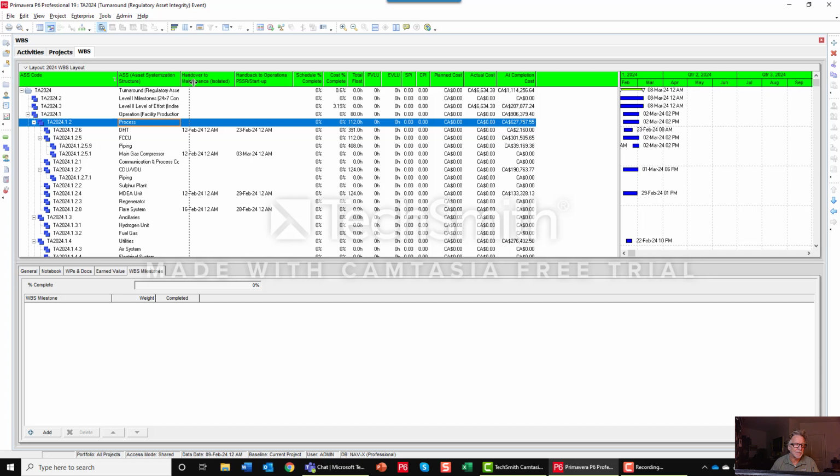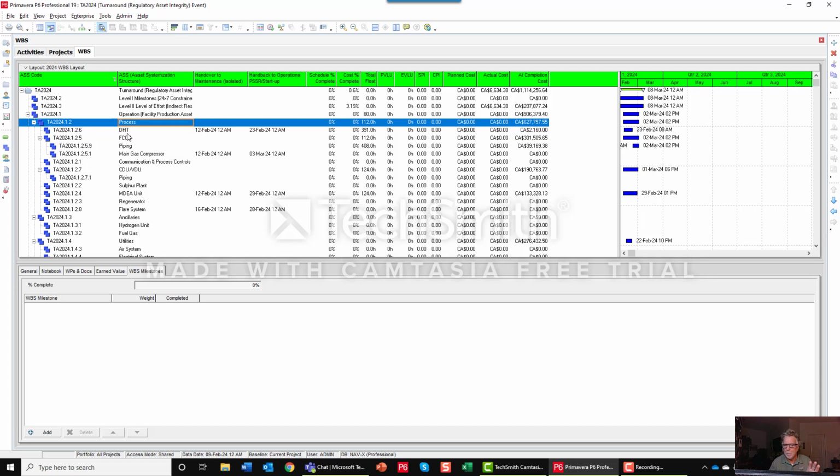What I'm saying is that this structure must represent or mirror your flock system in your SAP, ERP, or CMMS system, or whichever CMMS system you're using. The functional locations and the hierarchy or structure of physical assets in the manufacturing facility must line up and integrate. So there are three things that must line up and integrate. This structure, the asset systemization structure, the work order number, the equipment ID, and in some cases, the cost center.